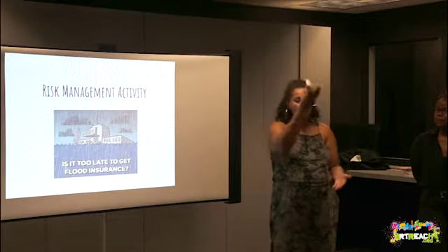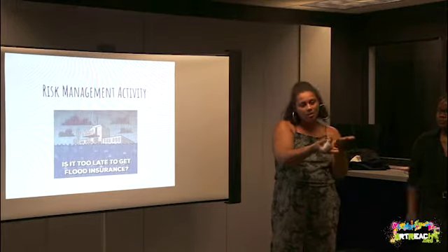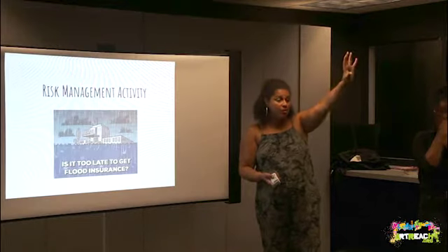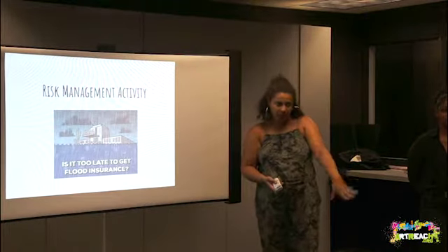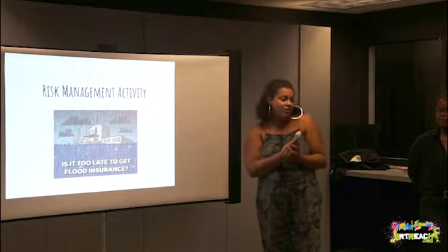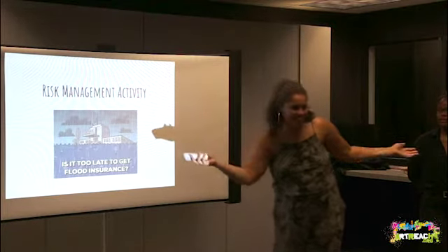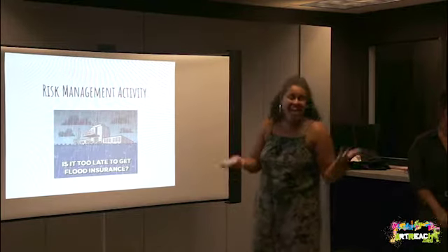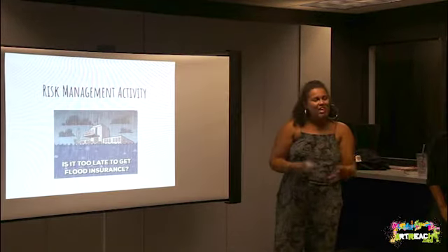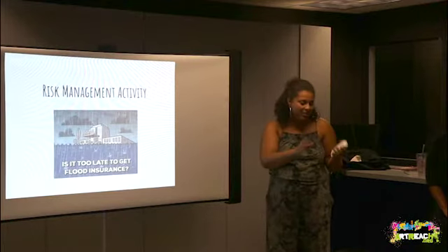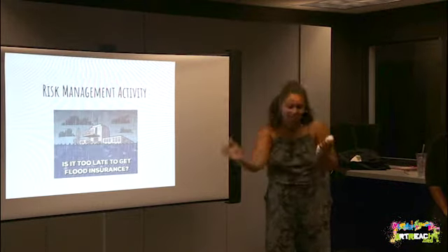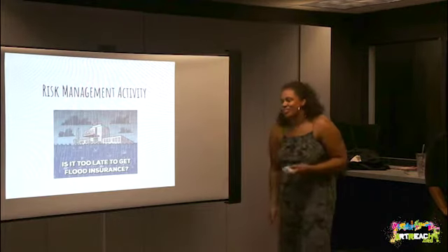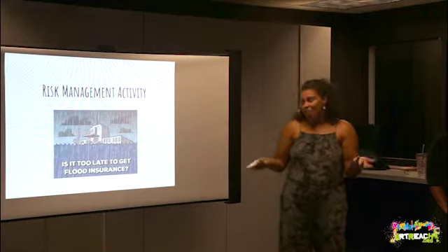And again, they're also ranked from most likely will happen to least likely will happen. Maybe you're popping after a CBC interview and everybody's like, yo, I want to volunteer now. That's a great opportunity and a positive risk, so you want to plan for that. If you knew the CBC article was going to happen, you'd say, we might be a little hot, let's add a few more volunteer slots just in case people want to jump on our wagon. So that's a great risk opportunity.